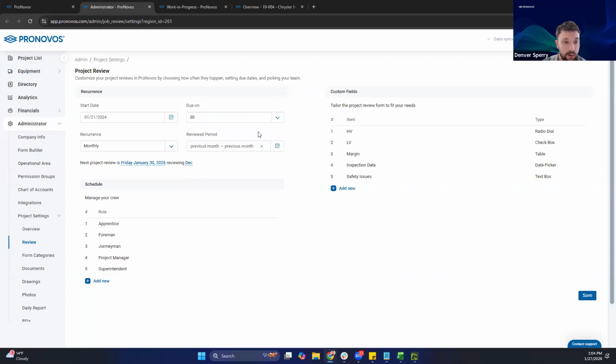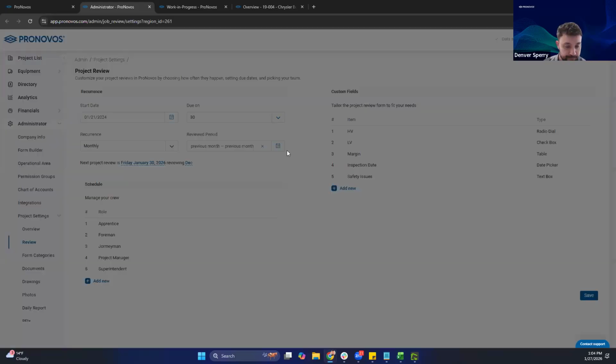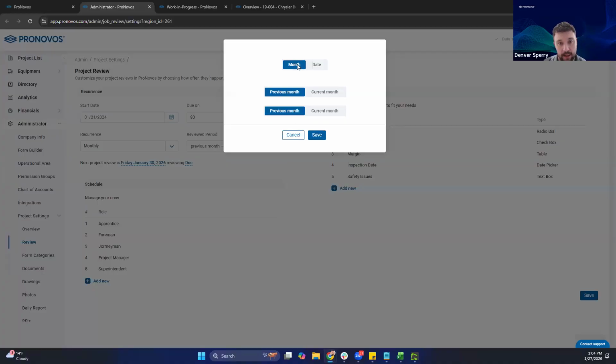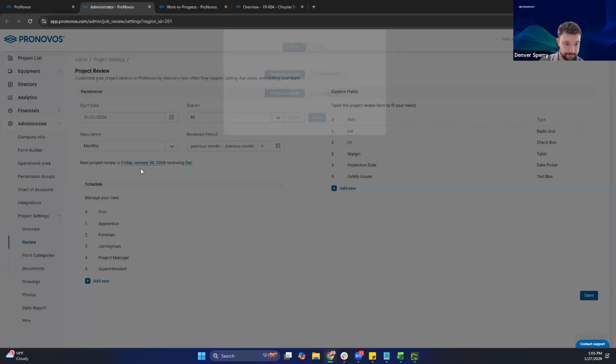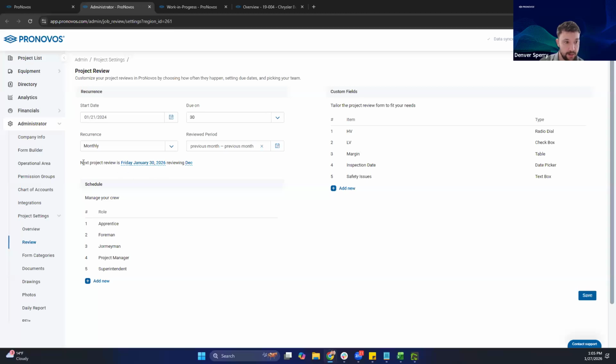Okay. And then in the review period, generally speaking, have the month selected. Prior month is by far the most common. So what this means in my setup here, my next project review is going to be due on Friday, January 30th, and I'm going to be reviewing the month of December. So that's pretty standard, pretty typical for how I would probably go about setting this up. Okay. Schedule and custom fields.